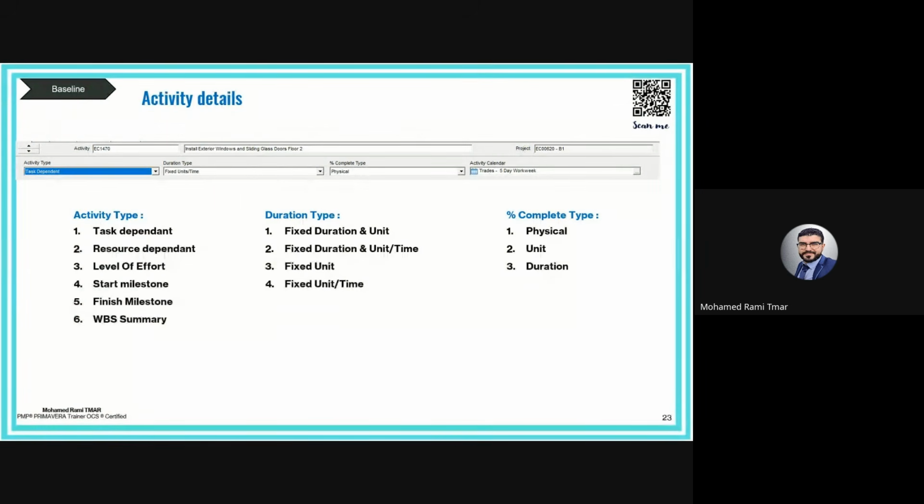Even between WBS you can create a sequence. It doesn't make any sense. Okay, and when we create the activity type as a WBS summary, it's an activity, but it's not a real activity. It's just created to assign those high level resources, which will be aligned or related to this WBS resource or cost. Okay. So it's just for reporting, not for planning. So why is activity type important?